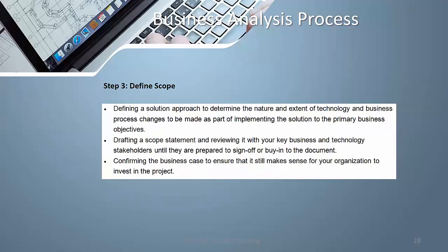So if you're going to automate the loan application process, everything related to loan application is within the scope, and outside scope is non-loan processing stuff like a payroll problem. If you have a problem with your payroll system, that is not a problem for this project. If you want, you can start a separate project for that, but not for this project. Okay.